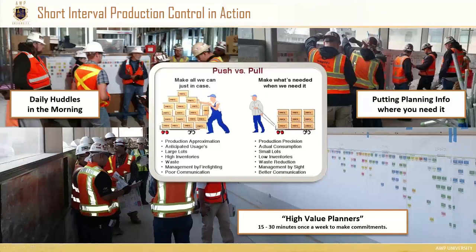These pictures show different types of planning activities — taken from a consultation on a hospital project, including daily scrums for daily planning activities. Identifying IWPs and work face planning as a true pull-type activity rather than a push activity is extremely important. Some organizations get lost and start pushing IWPs to the field rather than working with them in a pull fashion based on the foreman's plans within the level three schedule activity. Bringing forward a pull-type basis is extremely important in short interval production control.